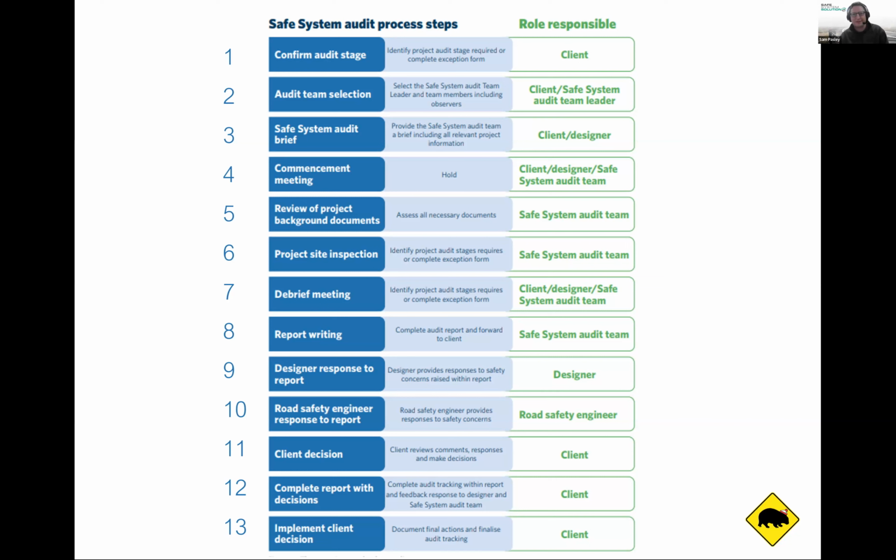And there are a couple of people I see in the call that are very, very familiar with this as well. So the level crossing safety impact assessment will do a safety review of the level crossing, how it's done, and it'll work through what form the level crossing should take. So it might recommend that you move up from a priority to flashing lights and bells to grade separation, say.